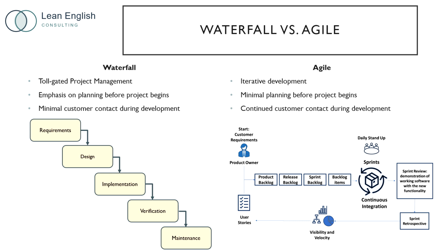Second, the meeting holds the team accountable for their work, as they must present workable software to the customer, even if it is incomplete. After the sprint review, the team meets to evaluate their performance in the sprint retrospective. They speak about what went well, what did not go well, and how to improve during the next sprint. Meanwhile, the product owner reprioritizes the product backlog and refines the user stories to help the team choose the most critical items to develop during the next sprint.